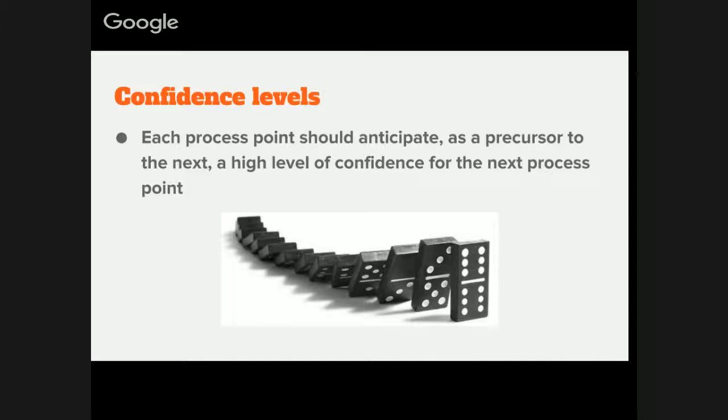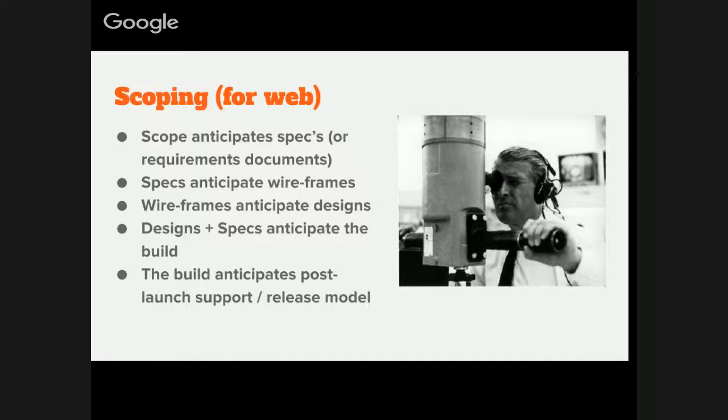Does that make sense? You're doing a discovery, or it starts really with the first sales conversation and the RFP, and that's giving you like 40% resolution on what you need. And then you go into discovery and you do things like wireframes. Each of these process points is actually anticipating the next.